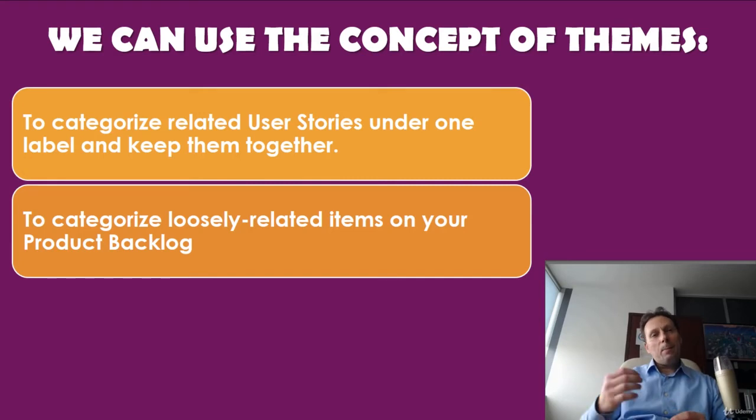So when you see emerging themes from your next sprint or two, this can help to give extra clarity to the team and business about the sprint goals. It also helps when priorities are set top-down. For example, let's say we make the commercial decision that for the next few sprints, SEO will be top priority. And you can quickly grab all your user stories with the SEO theme and give them a priority.